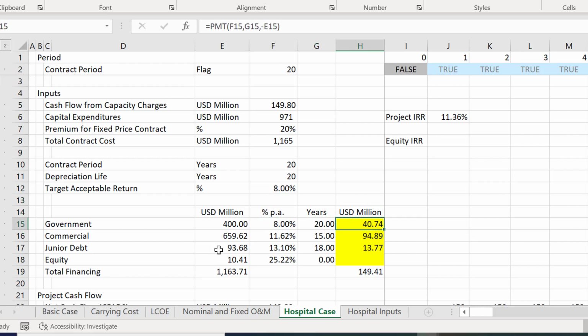One of the things is what's the premium we give? We give some kind of profit to the EPC contractors, so they'll take the risk. That's perfectly legitimate. They're not sure if they're signing a fixed price contract, they have to take the risks that they'll have trouble mobilizing their employees, they'll make some mistakes, they'll have to redo some stuff. Oh, that's fine. And then we put a contract period and